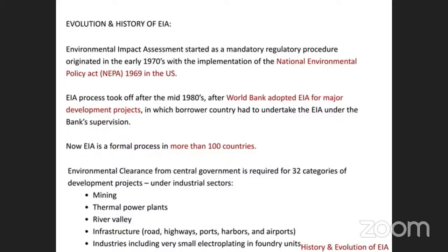And then, on 27 January 1994, the Union Ministry of MOEF, under the Environmental Protection Act 1986, gave a notification, the EIA notification, making environmental clearance mandatory for developmental projects. To start a developmental project or modernization of any developmental activity, or setting up the projects listed in this notification.